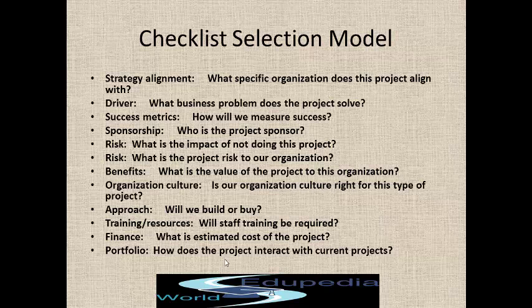Top down basically means the senior management gives you the money cost for the project. Then you need to allocate it to various divisions within the project. For example, analysis stage, design stage, coding and testing stage, implementation stage for an IT project. For other projects, it could be for a construction project. Based on the phases of the project, they need to allocate the money and budget to the phases of the project. So this finance is also a key factor.